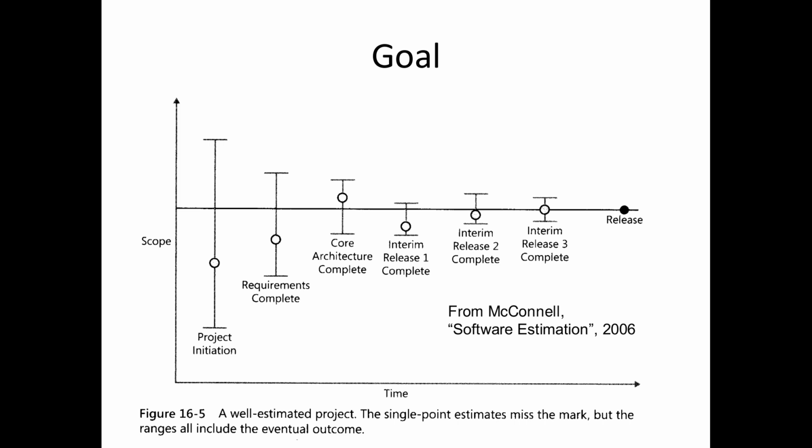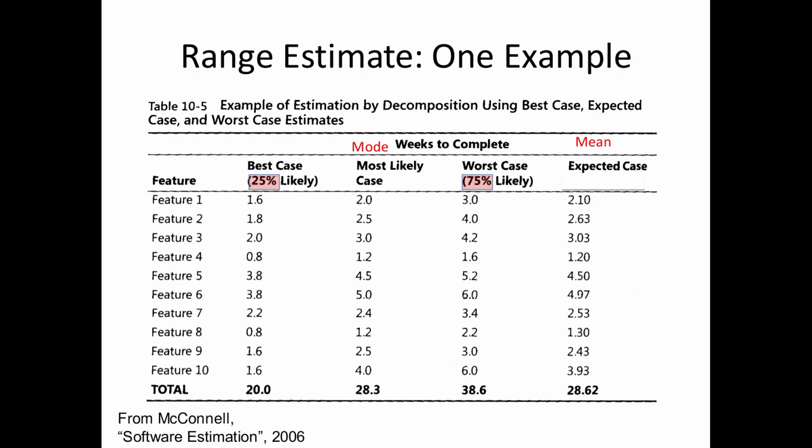What's the gotcha here that I mentioned last time? As you go this way, you get clear about how long it will take. But what's the gotcha? What's the difficulty? There's not much you can do to affect it anymore, because a lot of that time has been burnt. And even if you speed up the remaining stuff hugely, there's only so much gain you can have. So we tend to become more certain at the times we can least do anything about it.